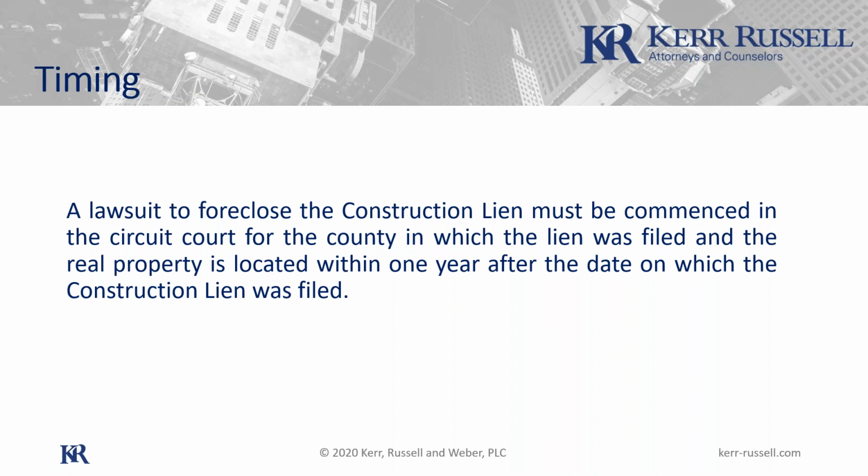All right, then the other big red light, that's more usually with your lawyer than with you, although you need to be aware of it as well, is that one needs to file his suit to foreclose on his lien within 1 year of the recordation of the lien. So in my example, where I raced out to Oakland County on January 2nd, that means that on January 2nd of 2021, I have to have filed the complaint in court to foreclose on the lien. Otherwise, the lien becomes invalid. So that's a hard deadline.